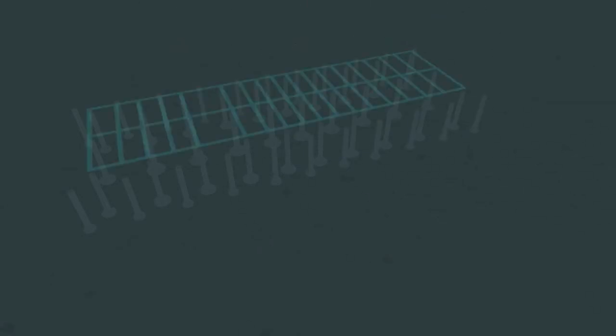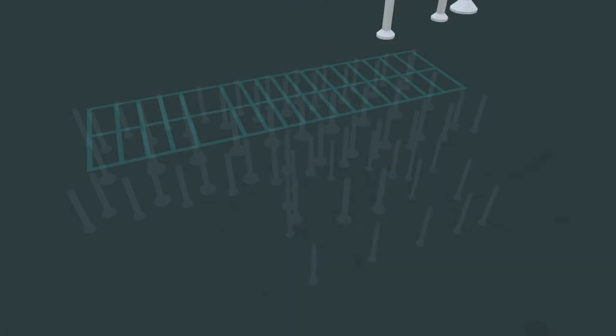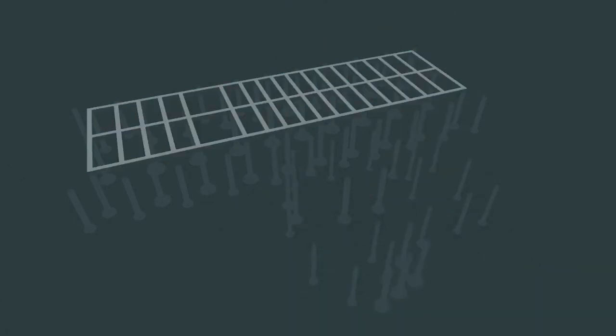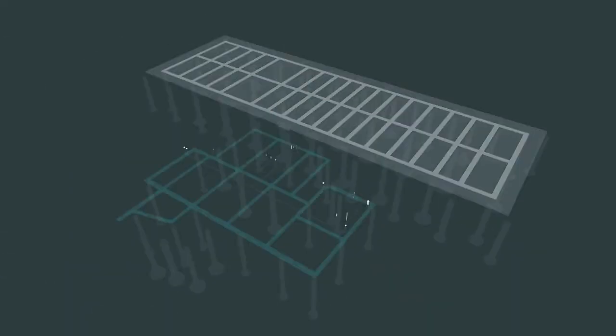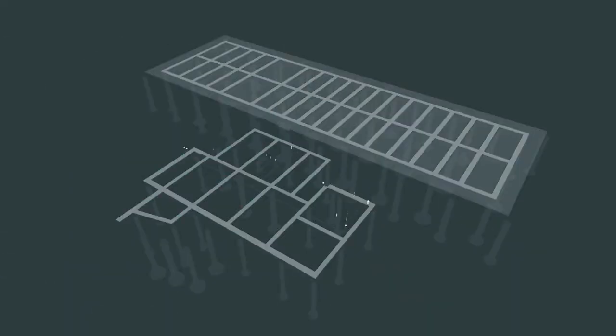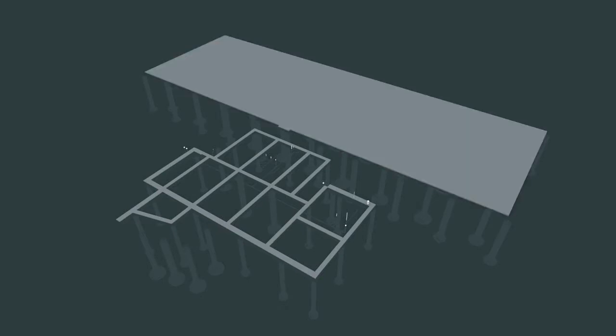Once the warehouse piers have cured, the grade beam work can begin. The underground utilities will be installed after the office piers have been poured. Following that, the formwork and pouring of the warehouse slab can begin, and the same will follow for the office slab.